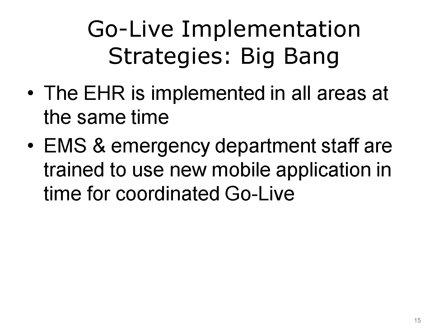BIGBANG is an organizational approach that implements a system or integrates a new capability at one designated date and time. An example of a BIGBANG implementation would be, starting at 1 minute after midnight on November 16th, the new EHR becomes live at all sites of XYZ Health and the old system is no longer used.